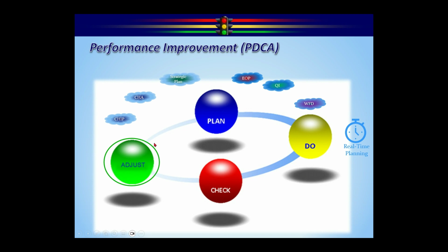The other option might be, we can still get to that plan, but we just don't have enough resources yet. So maybe we go from 9 to 12 training sessions a month. Maybe there's more tobacco vendors out there than we thought. We're going to get to those folks. Maybe there's a whole other set of activities that we could implement that'll get us there as well. And then there is a 4th option, kind of an in-between, I guess. Maybe the plan is just a little bit too high. Maybe 23 is a realistic number. And maybe if we go from 9 to 12 training sessions a month, we can get to 23. So those are the 4 options.